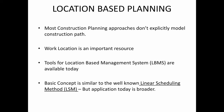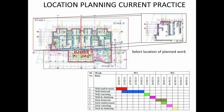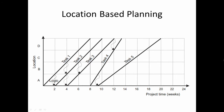What location based planning does is actually try to bring the space resource explicitly into your plan or schedule. This is not very easy unless you have appropriate tools. Today, tools are becoming available to do LBMS very systematically. You might have heard of the technique called LSM or linear scheduling method, which was primarily used for linear projects such as roads, pipelines, or railway lines. LBMS is based on linear scheduling method techniques. A location based plan has location on the y-axis and duration or time on the x-axis, with each task going through a particular location at a particular time.